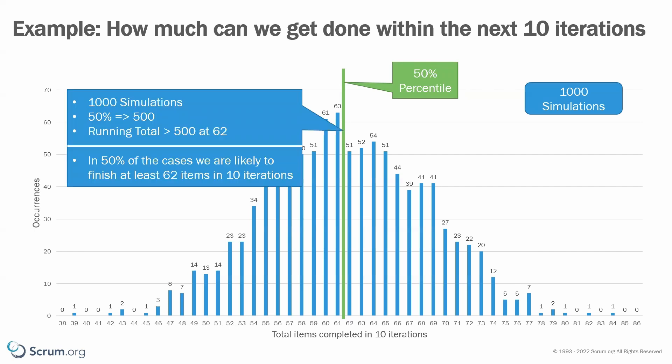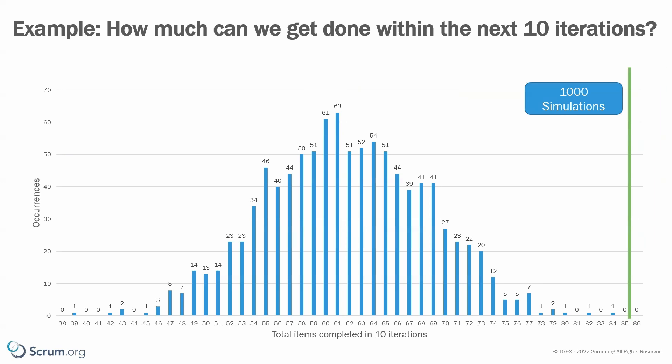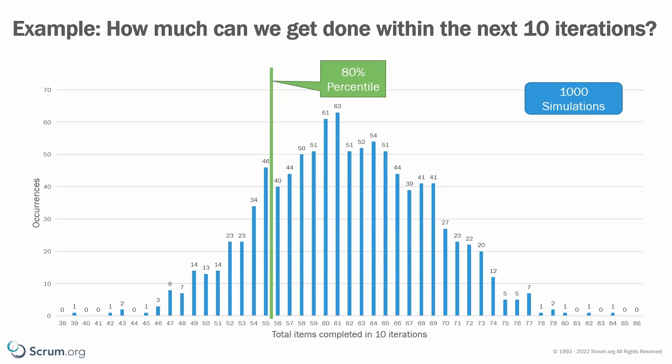If you want a higher confidence, then obviously the number of items has to be lower, because there is a higher chance that we can complete lower numbers of items. So let's rerun this with a probability of 80%. 80% of our 1,000 simulations is 800, so we run from right to left until we reach an accumulation of 800, and then we will see that we might complete 56 items or more with a probability of 80%.